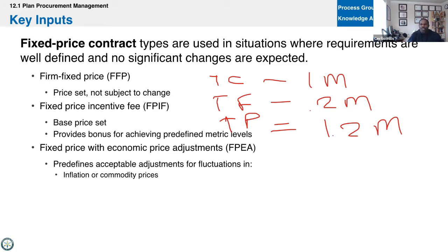It's usually reserved in these types of deals. There's a very small amount of people that can do it, and it's work that's not done all the time. So we're sort of embarking on this journey together for the first time. So you're calling me in as the expert, and I'm telling you that I think it's going to be $1 million of cost, but I'm not sure. But we could have overages of 30%. And so we agree that, okay, no more than 30%, that's the cap. It could be more than that. It could be 80%, and then that means that our ceiling price would be 2 million, right? But since we're going to do a 30% cap, another 300,000 overage, now that makes our ceiling price 1.5 million.